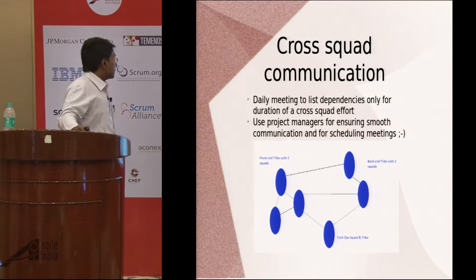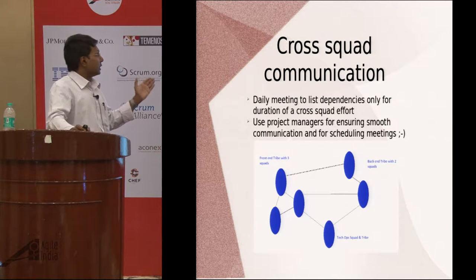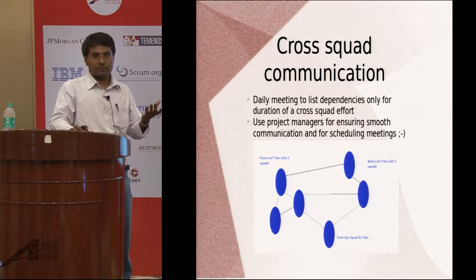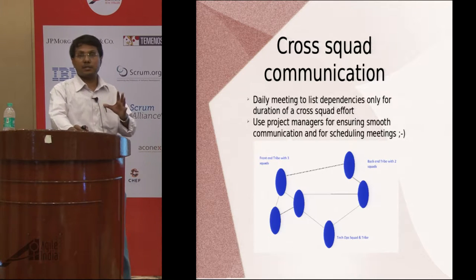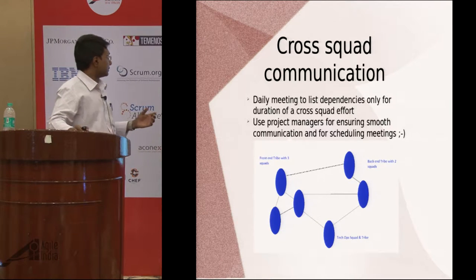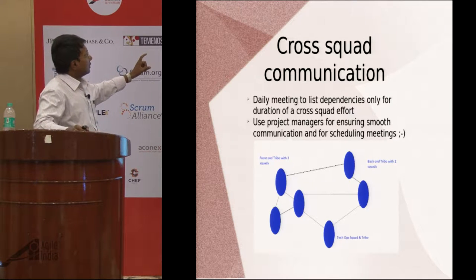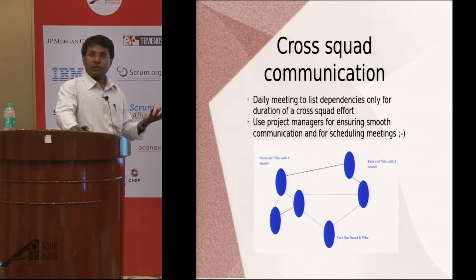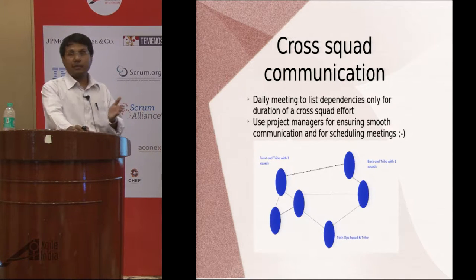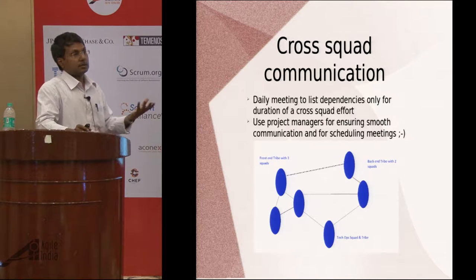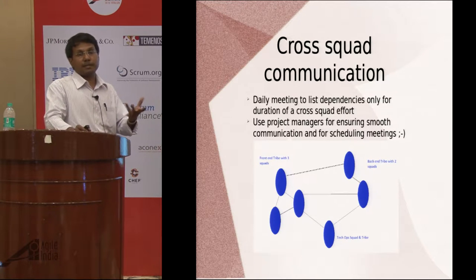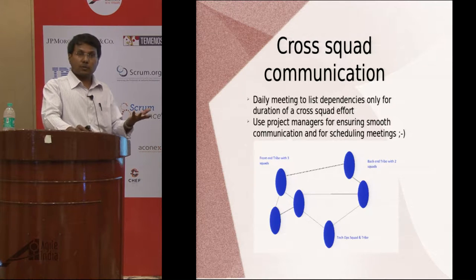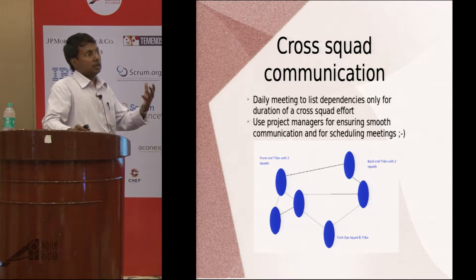For cross-squad communication, there is a daily meeting to list dependencies only for the duration of a cross-squad effort. A squad cannot complete the entire software end-to-end, so there will be dependencies, but the software should be designed to minimize them. Project managers were used to take care of cross-squad communication and scheduling meetings for squad members. The Spotify model is kind of an open-source model where you adapt the solution to fit your organization.